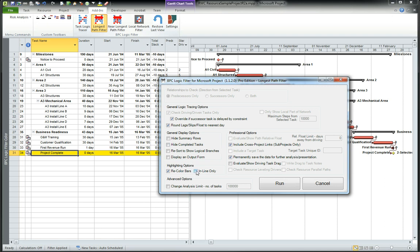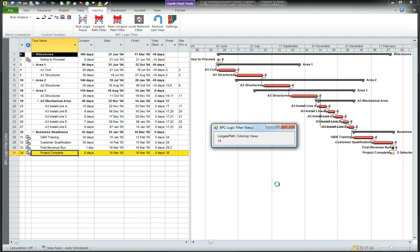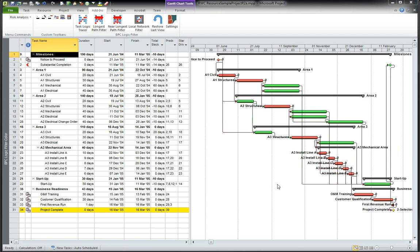Let's run it and show inline only. Using inline only gives us the entire project or at least the entire view that we had previously and the tasks that are not on the longest path are turned green and de-emphasized in this view. Okay, that's longest path in BPC logic filter.